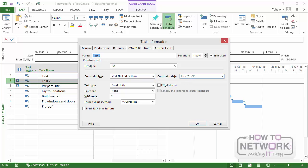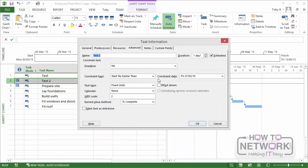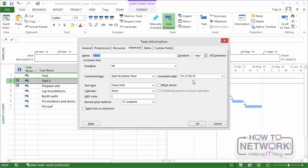Now I could, if I wanted to, remove that constraint. This is just the default behavior of project 2013. But in a situation where the project start dates in the past and you're creating new tasks on the current date, this is the constraint that's automatically added. Now this constraint basically is an additional scheduling factor. So when project 2013 tries to work out a viable schedule for this project, it will take into account that this task should not start earlier than today. So basically with constraints in general, we are telling projects scheduling engine a set of rules about each task. Now a task can only have actually one constraint. It may be constrained by other factors such as the availability of resources or dependencies on other tasks, but it can only have one constraint.